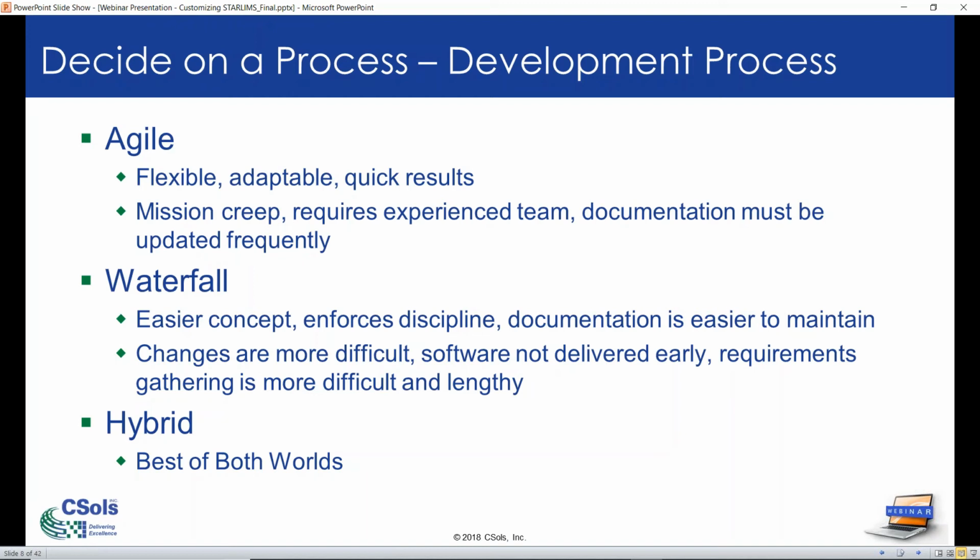Most likely, you will use some hybrid of the two processes, with a development cycle that leverages an agile approach, while the final UAT and validation steps may be controlled in more of a waterfall method. I've worked on projects that have switched more than once, where we started with a lengthy requirements and design phase that were executed in turn, followed by repeated development sprints, and completed by testing and validating in sequence. So there's lots of wiggle room as long as everyone is on the same page.